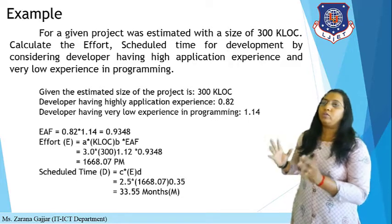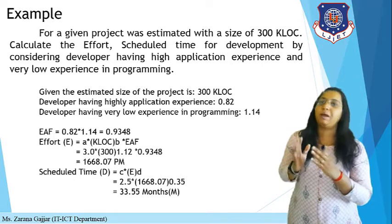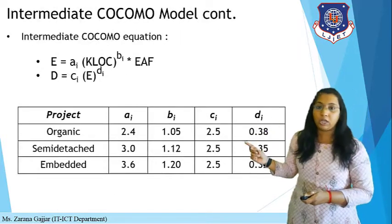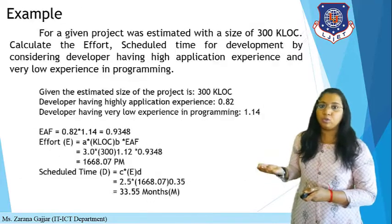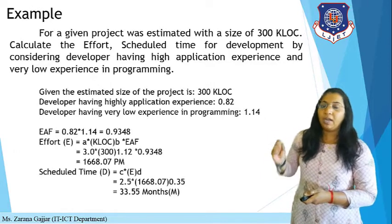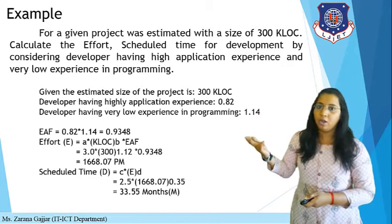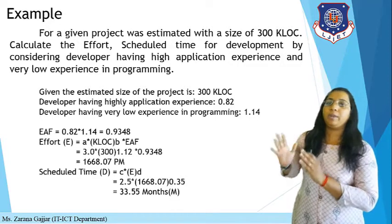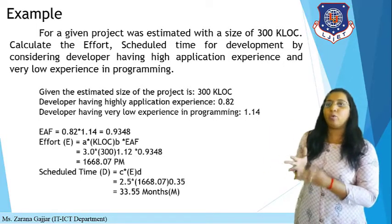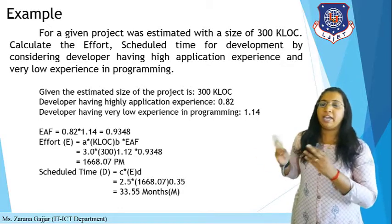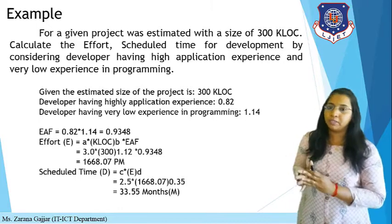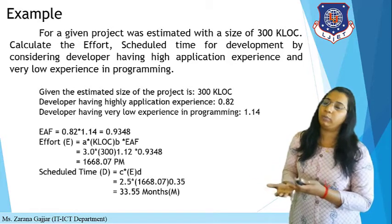Now put all values into the effort formula: E = A × (KLOC)^B × EAF. We selected semi-detached, so the constants are A = 3, B = 1.12, C = 2.5, and D = 0.35. KLOC is 300 and EAF is 0.93. Calculating this equation gives an approximate effort of 1,668.07 person-months (PM). For development time, using C and D constants with the calculated effort gives approximately 33.55 months — so approximately 34 months to complete the software product.